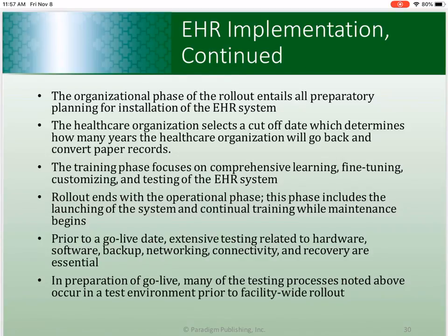In the training phase, this is when we're learning and fine-tuning, customizing, and testing the EHR system. Now, when we are in our operational phase and that ends, then we're going to launch into the system and we're going to have training while maintenance begins. Prior to a go-live date, our testing related to hardware, software, networking, connectivity, and recovery is essential.